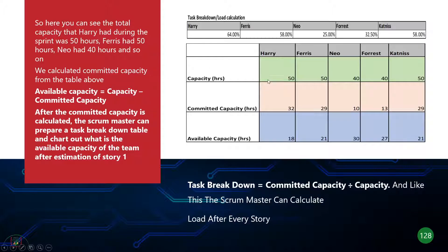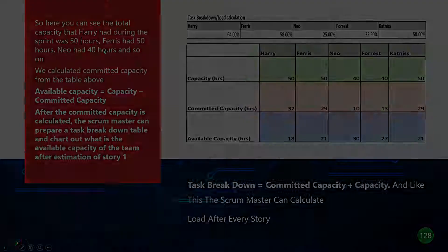As a scrum master building this out, you need to account for holidays, vacation days, company holidays, and focus factors as covered in the seven steps, then figure out capacity based on the hours provided by the team. For example, the total capacity for Harry during the sprint was 50 hours, and Ferris also had 50 hours, assuming they're 100% committed.